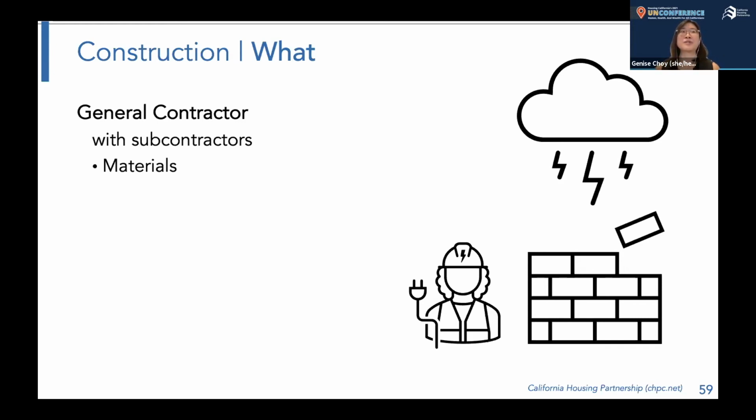I remember a few years ago when there were tariffs being put on products coming out of China that really impacted the acquisition of solar panels. So I had a contractor who bought them all ahead of time, stored them on site, and then installed them later in the construction process, but that saved us a lot of money.